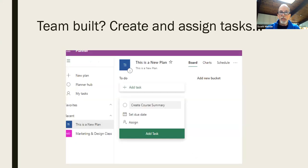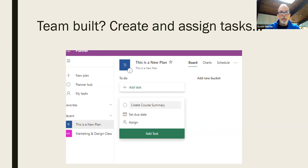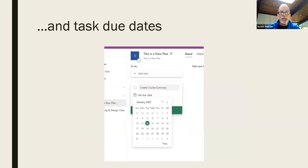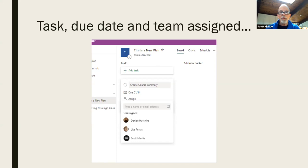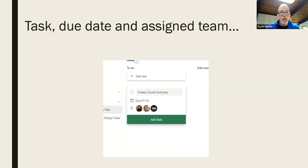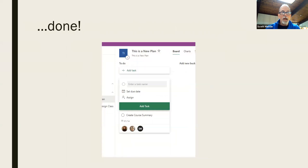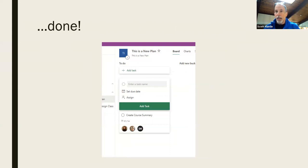So once the team is built, it's time to create and to assign some tasks, a beautiful thing. Take those tasks, make sure other people can do them. So inside of adding a task, we are going to go and put in what is it that needs to be done. In this case, this is to create a course summary. And we just simply type that in. We give it a due date, pull down menu. And then we go ahead and we assign as to who might be doing those tasks. And it could be one, it could be many, but we're going to try to choose from those that we've already put on our team. This is a great opportunity. So all three of us have been put in and here's what we've ended up with. We're going to create a course summary. We have a due date and we have who the members are that have been assigned to complete this task. And there we are, we're done. It's been assigned. We have the date, the folks are there. And so in essence, inside a planner, we are taking care of assigning one test.